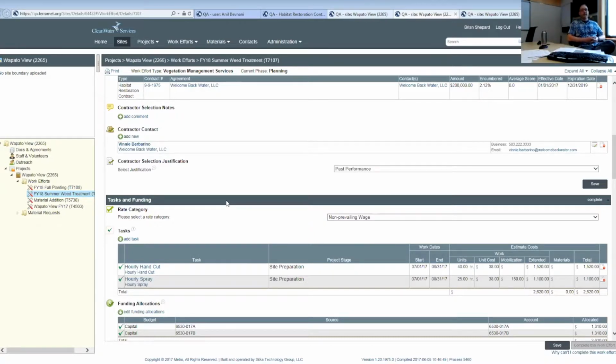And that's just one example of where we were very intimately involved with our legal department and working through the customization of this to make sure that what we were doing was acceptable to them. And it's provided much improved workflows. We were working with Excel and Word-based templates to create these work efforts previously. They were disconnected, so essentially it was up to the user to select a contractor, provide justification, select all the tasks, and then copy and paste that into a Word template that became the contract. And hopefully they didn't overwrite the template, they provided the right data, and they didn't get confused and save it as the wrong name.